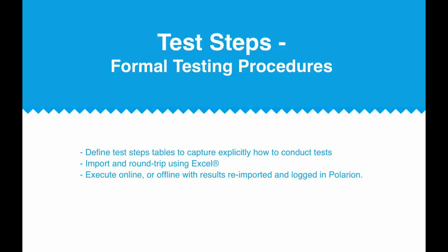So the best practice that we recommend to our customers is to make the requirements small, so every single modification of a single requirement is traceable. You can understand the impact. You can understand why this modification has happened. And the same applies actually for testing.